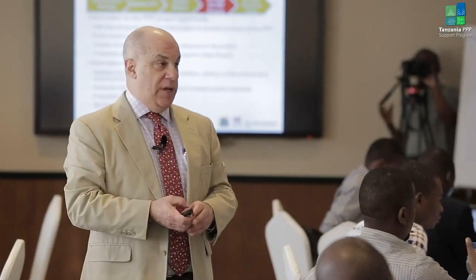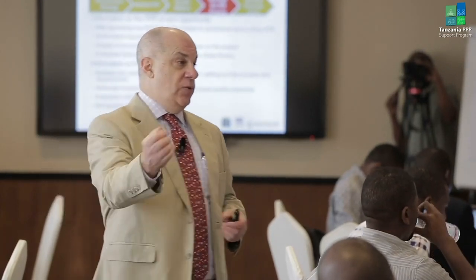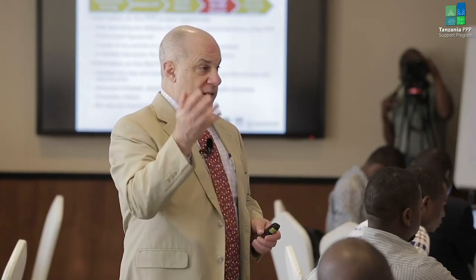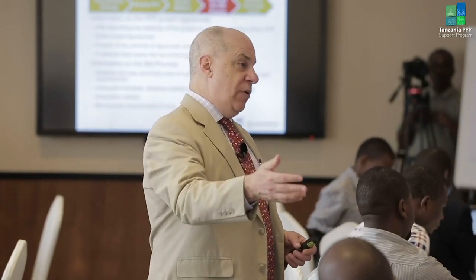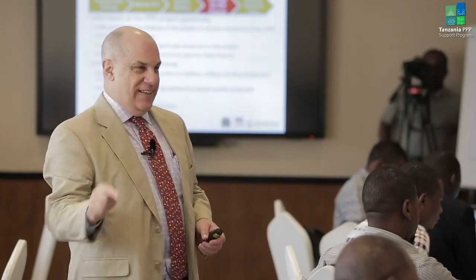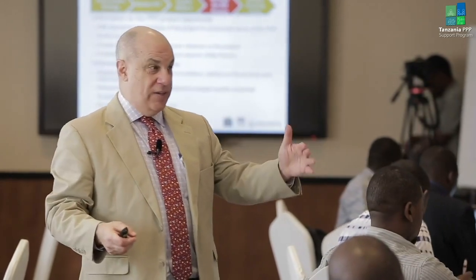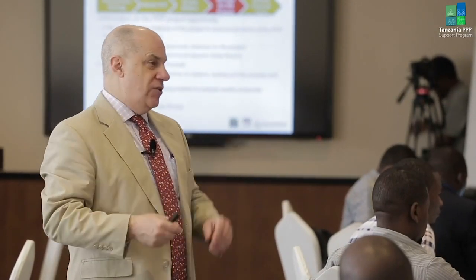Right. So oftentimes what you'll ask for, as evidence of them being able to obtain funding, is what they would call letters of intent. Banks would issue letters of intent that say, provided that you're selected as the preferred bidder, we're prepared to lend you money for this project. And then there's always a paragraph that says, subject to, it doesn't guarantee that they're going to get the money. The bank will still want to do their own due diligence, but it's the intent. That's actually a very good point. You want to know that they have access to funding.